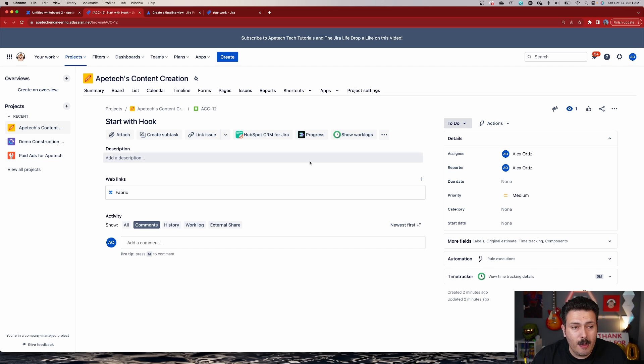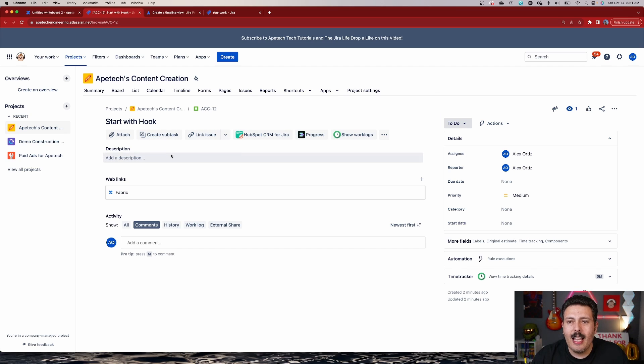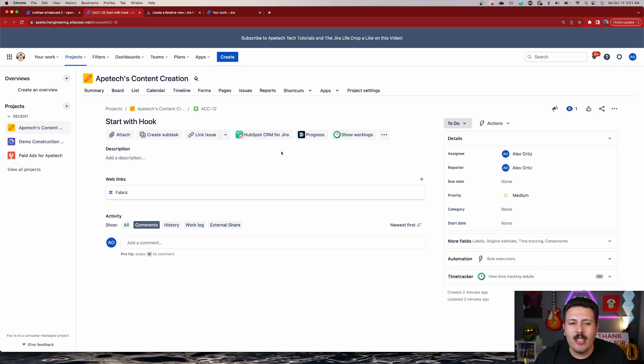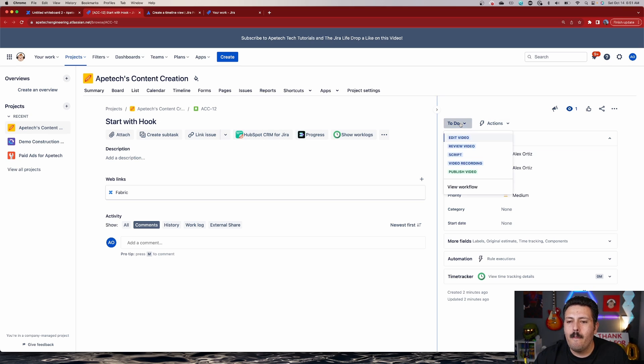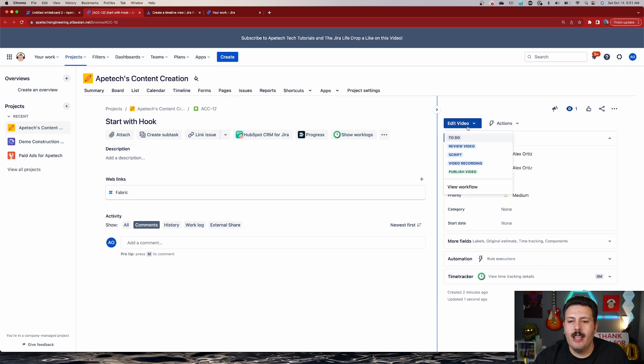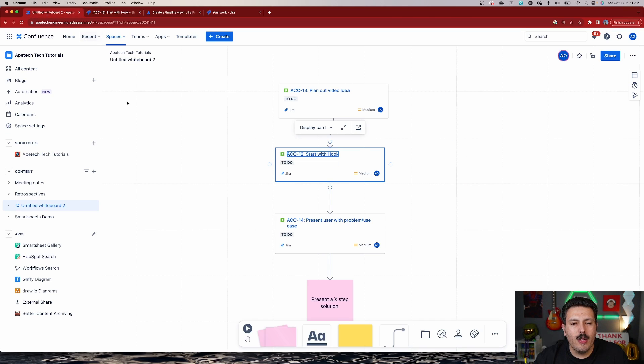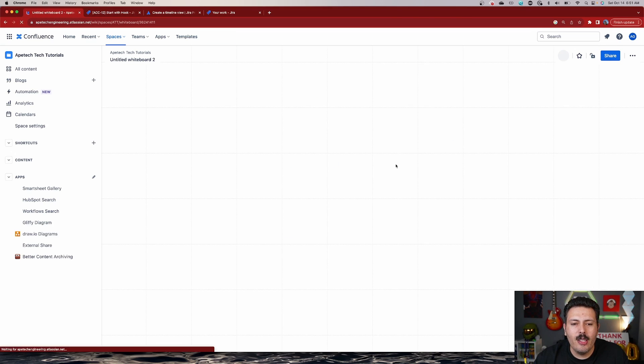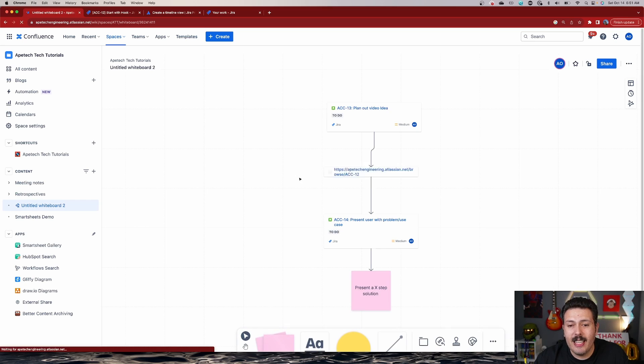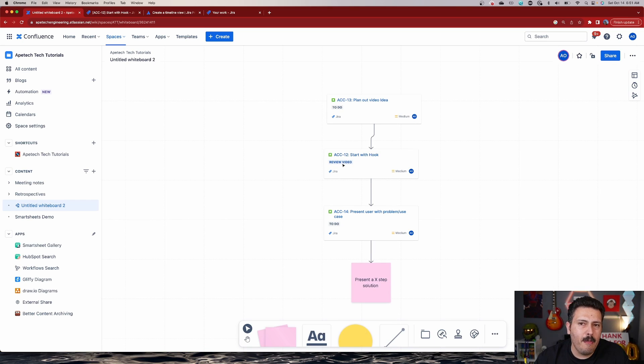And then from within Jira, I can obviously plan this into my sprint. I did not pick an agile board, I just randomly picked something. But if it was an agile board, you would plan into your sprint. But your team, they can go to like edit video, and they can go to like review the video. And in the whiteboard itself, you click a little refresh over here. And you're going to see that you're going to get that value that information right back out of Jira.